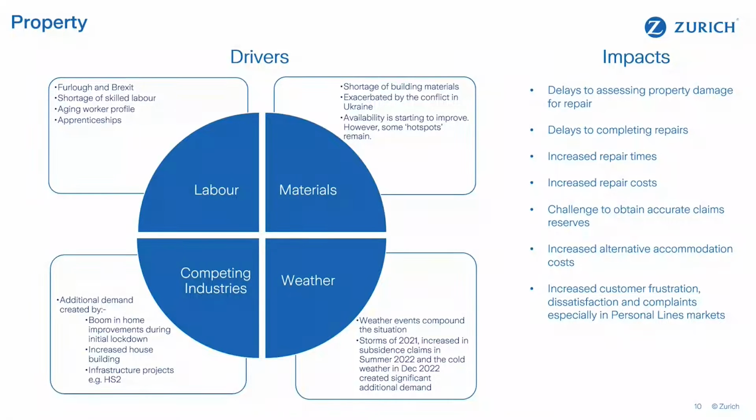In terms of building materials, average inflation for building materials was about 15 to 20% last year, but some examples which are higher than that can be UPVC windows, which are said to be about 45%, roofing materials about 28%, and anything involving clay, such as bricks and tiles and so on, about 26%.